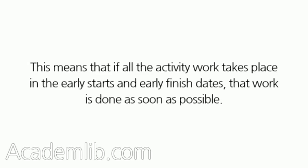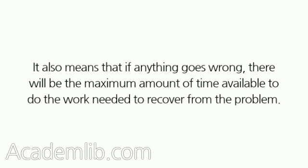This means that if all the activity work takes place in the early start and early finish dates, that work is done as soon as possible. It also means that if anything goes wrong, there will be the maximum amount of time available to do the work needed to recover from the problem.